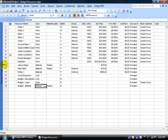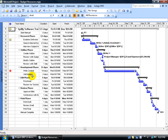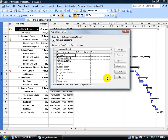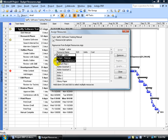To do that, go back to the Gantt chart by right-clicking on the collapse view bar and going to the Gantt chart. Come up here and select the project summary task, which is task zero, then click on the two-person icon for Assign Resources, or use the shortcut key Alt+F10. You'll see the budget for labor, material, and miscellaneous or cost. Click and drag to select all three, then click Assign. They're checked, so they've been assigned and we're finished.